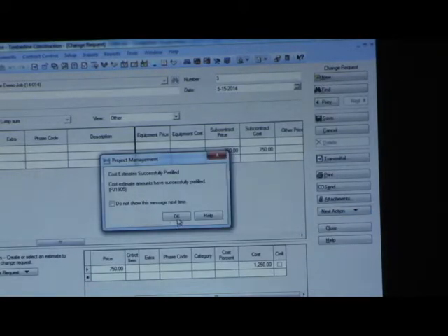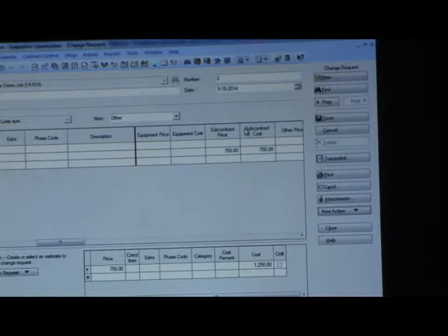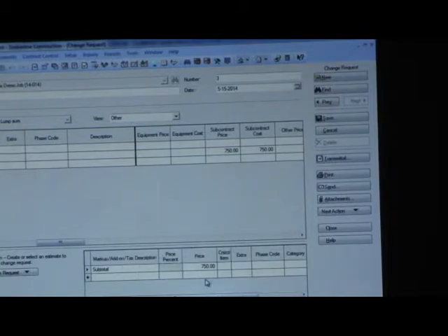And so there's a button over here called pre-fill estimate. So I typed in the quote, it copied it to the price. I said I'm ready to pre-fill estimate. That copied it to the cost. And so here's where you could say I'm marking this up. You could put a line down here that says markup 15%, and it would do that math for you, but it's doing it globally. Or you could do the math up here and say, you know, my customer is going to pay me $1,000 for this work, but it's costing me $750 is what I'm paying my sub. So you can adjust those numbers in the line item, or you can add a markup down here.